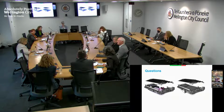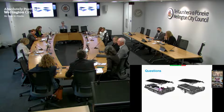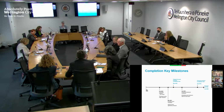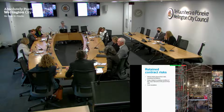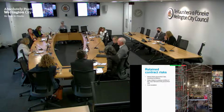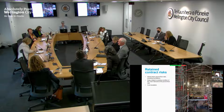So I can answer that, and Danny can pitch in as well. They're quite different projects. They're quite different buildings. So the town hall was built in the 1900s. The library was built late 1980s. The ground conditions are very different as well. So the library is sitting on bedrock. The town hall has got very variable ground conditions, which make it very, very difficult and made the piling extremely difficult. We're also working through the design.